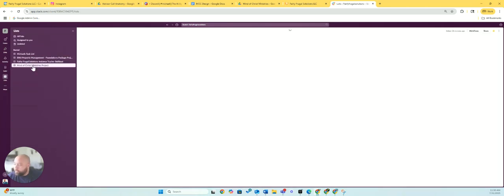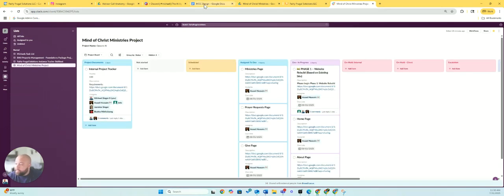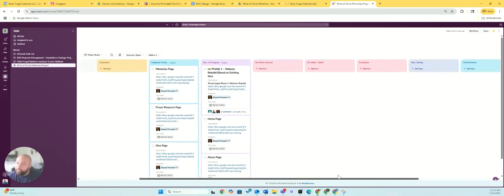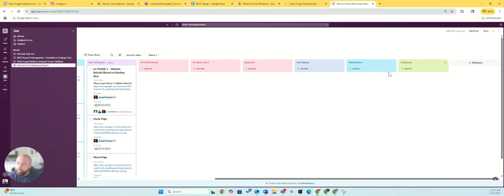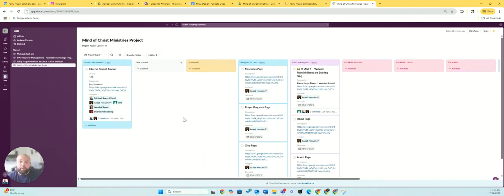What will happen now is phase 3 will be taken from the design document, and it'll be set as tasks here as not started. And when our project manager gets a hold of it, it'll go into the scheduled status when he schedules a developer or engineer, and when he assigns it to dev, and when they are actually developing. And then we have certain criteria and specs on how we align throughout our project board all the way through completed. It's how we associate everything, and this is how we do framework and the implementation of our projects.